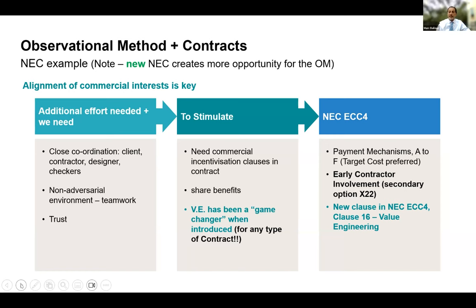Summarizing a little bit in practical terms what you're showing, right? No, that's absolutely a key part of it. And the client needs to understand that they will get benefit as well, because often the key benefit for a client would be a saving in time, and also a saving in cost. And that will often save disruption to local communities, particularly for urban projects, which is really important. Time and money, because he's not paying for the extra work. He's just paying the profit part of that extra work. Exactly. So having that embedded in the contract is vital.